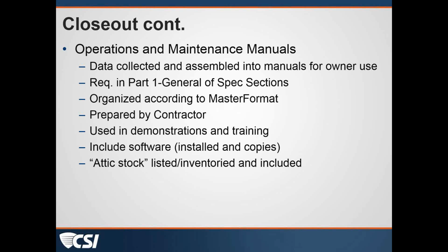One client I work with, I think this was kind of taking it to the extreme, not only did the contractor have to submit a separate letter that certified that they had maintained the record documents for that month, the architect also had to sign a certification that he reviewed those record documents before he could sign that certification for payment for that month.